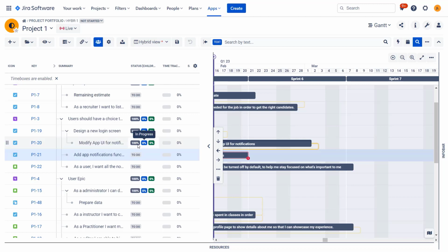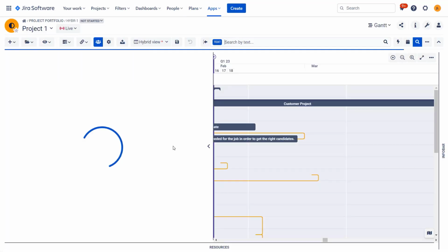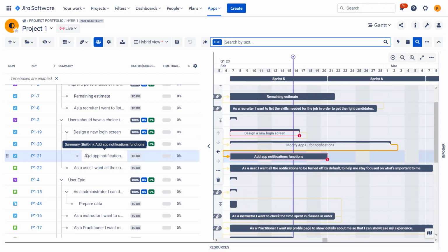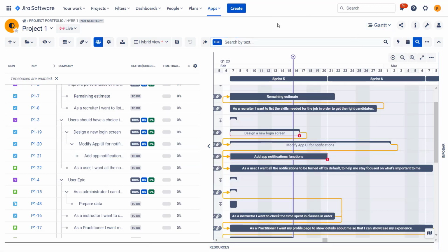You can see that the fields over here already changed as it would have children. It is not displayed yet over here, but if we refresh, it will be. So this is what I meant when I said that if you already have hierarchy in Jira reflected based on links, BigPicture will be your friend. So you can import all these issues or put all these issues into a single box, enable the structure builder, and BigPicture will understand that based on this link, it should just create this parent-child hierarchy.